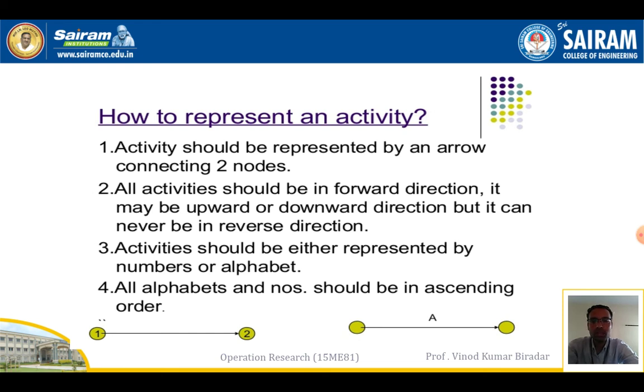As shown in the diagram, activities are connected by an arrow mark between two points. All activity should be in a forward direction. It may be upward or downward, but it can never be in the reverse direction. It cannot go backward.